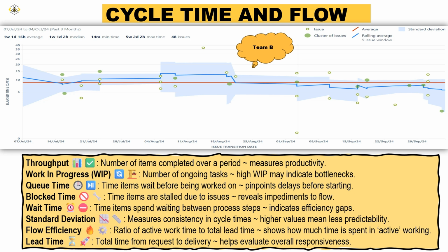It's very good to leverage control charts to shorten the handoff delays by automating transitions and notifications in Jira. Try to use Jira automation to get this done. Also introduce work in progress, or WIP, limits if cycle times are unpredictable to prevent overloading team members.